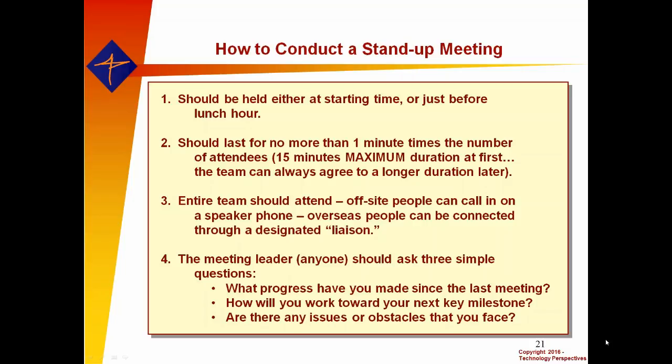3 questions down at the bottom of the slide. The first one, what progress have you made since the last meeting? Tell us about what you're actually doing, not just still working on the widget or I'm 20% complete. What are you doing? I'm doing some finite element analysis, or I'm running some circuit simulations, or I'm looking at some processes in the factory and I'm seeing how they might work. Tell us what you're doing. Make it interesting and also help the team see the big picture.